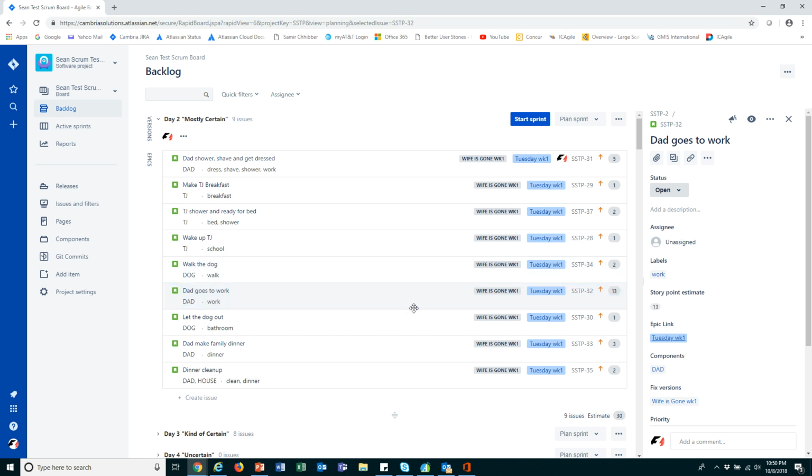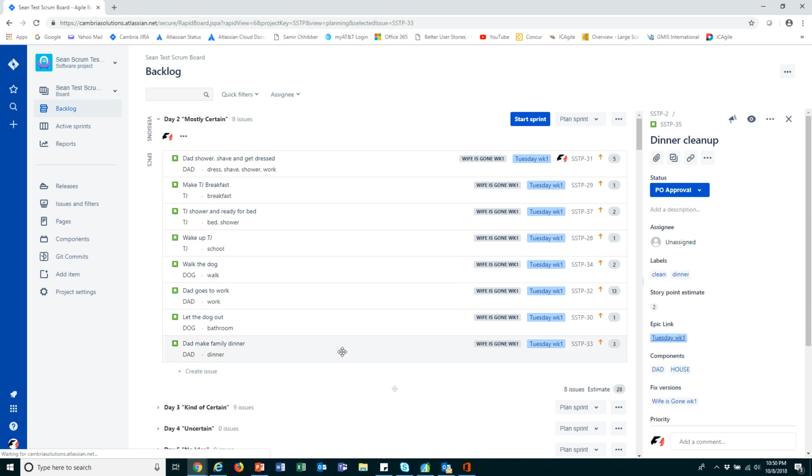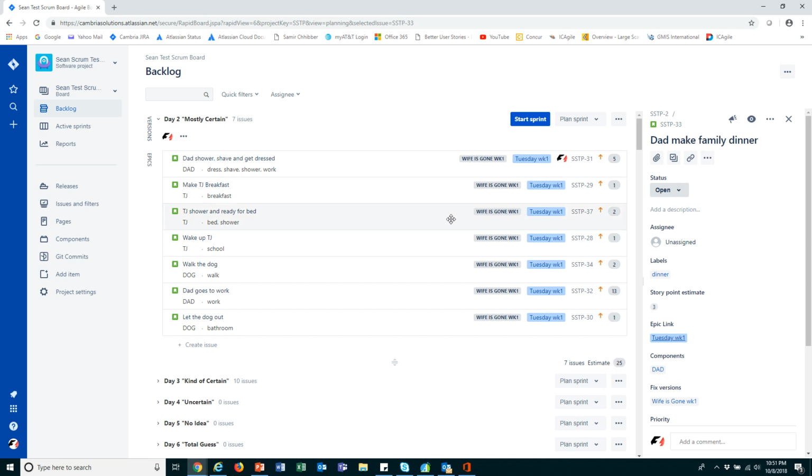but at the moment, shooting for about 25. So if this is properly prioritized, then these two down here represent about 5 points. Those we can move to the next sprint, and now we've landed back at our 25 number. And once the team is now happy with the amount of points that they have in their active sprint, and they are comfortable with committing to those points, now it is time to launch the sprint.